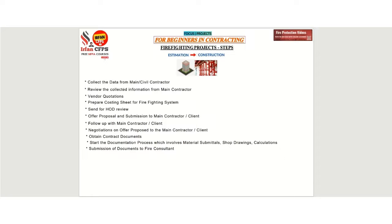Upon preparation of material submittals, drawings, and calculations, we need to submit the documents to the fire consultant for his approval. In the twelfth step, simultaneously while preparing the submittals and drawings, send your site engineer to the project to check the status of the project.